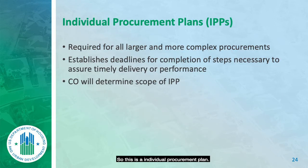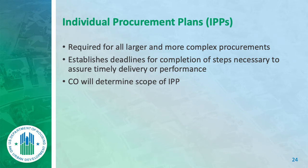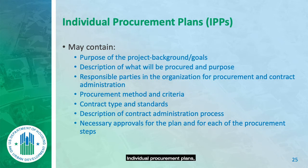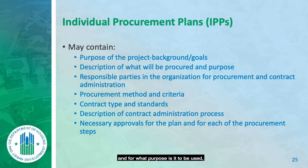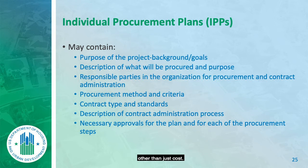This is an individual procurement plan — the IPP. It's required for larger and more complex procurements, though I do them for every quote, bid, or RFP to stay consistent. It gives you established lines to remain aware of and helps you determine the scope of the RFP. IPPs may contain a description of the work requirements, what you're procuring and for what purpose, who's assigned, and help establish the procurement method — whether a bid or quote for low-cost award, or an RFP.